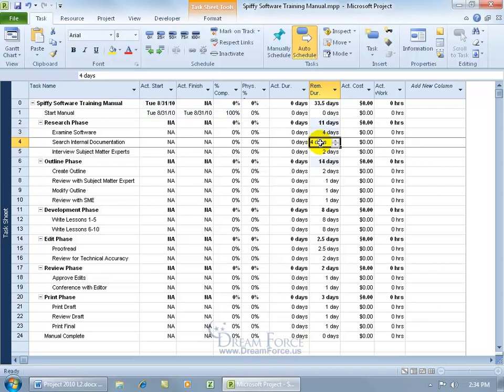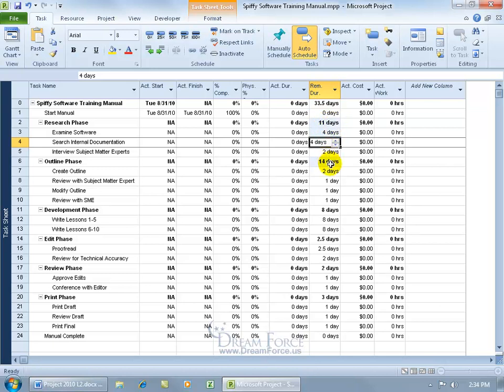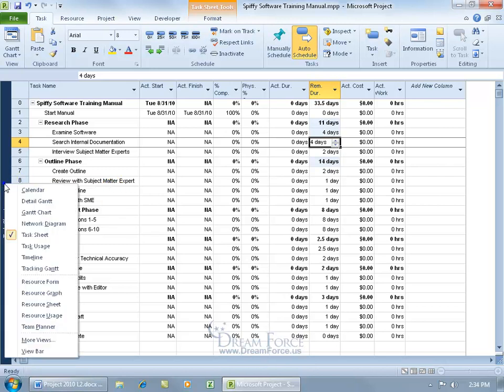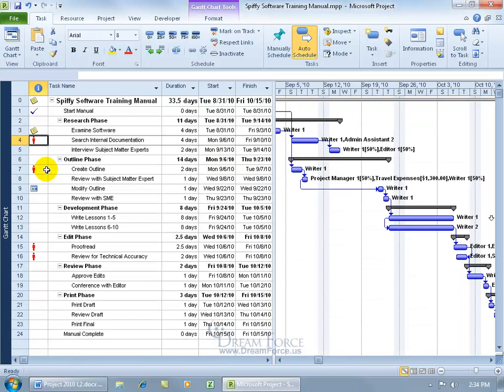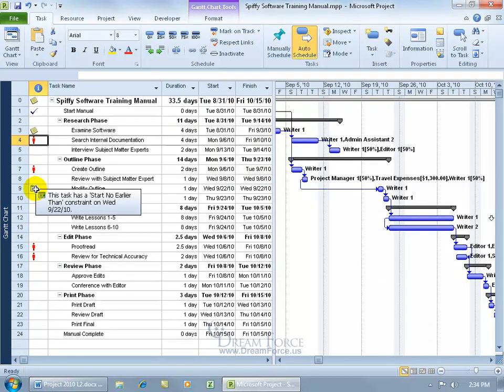So, when I hit enter, there you go. Now, it's four days, and what's interesting about this is that it went from 12 days, because we reduced it by one day for the research phase to 11 days. But why did this go from 13 days to 14 days? Why did it increase? You'd think it would reduce it, if anything. Well, it's knowing your project, and this project here, which is different from the project exercises we covered in Level 1. I wanted to change things up a bit so you have something to work with or figure out, as it were. But there's actually, over here, let me go to the Gantt chart, right click, and in the Gantt chart, you can see the indicator column on Task 9. It has a constraint.